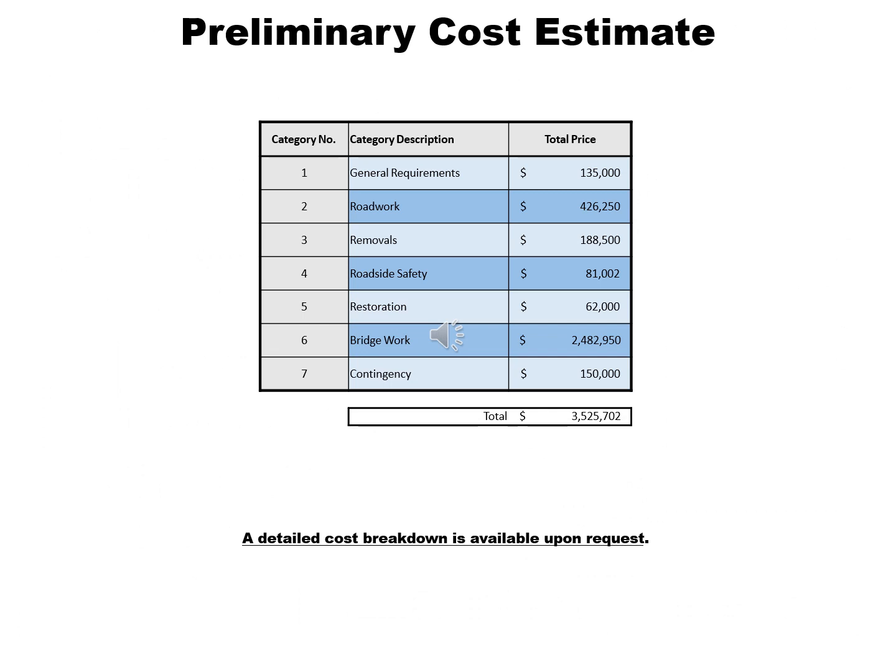Preliminary cost estimate. This cost estimate has seven categories: Category 1, General Requirements, estimated at $135,000; Category 2, Roadwork, estimated at $426,250; Category 3, Removals, estimated at $188,500; Category 4, Roadside Safety, estimated at $81,002; Category 5, Restoration, estimated at $62,000; Category 6, Bridgework, estimated at $2,482,950; Category 7, Contingency, estimated at $150,000. The total of these estimates is $3,525,702. A detailed cost breakdown is available upon request.